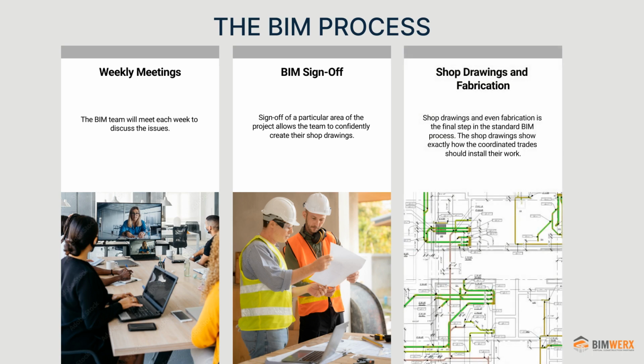After sign-off, each trade will create shop drawings from the coordinated model. The shop drawings typically contain dimensions, sizes, elevations, etc., allowing the field team to build as coordinated. Sometimes, the models are turned over to the fabrication team to allow for prefabrication. The BIM team knows that the prefabricated components will fit without issue.